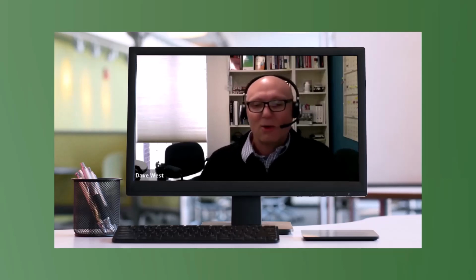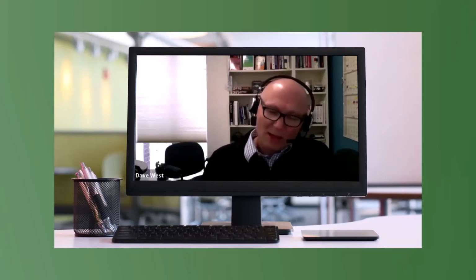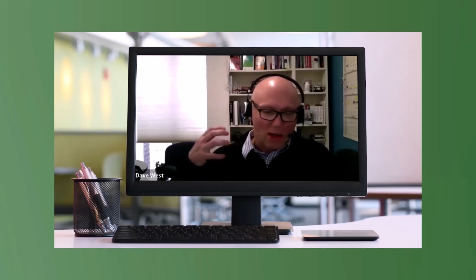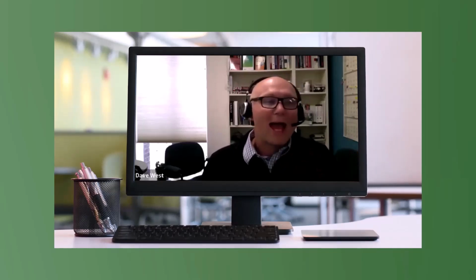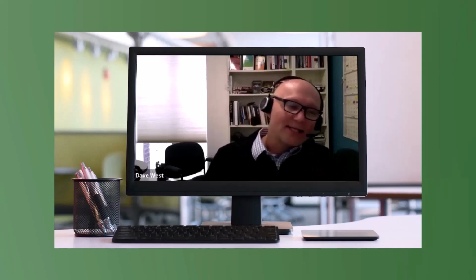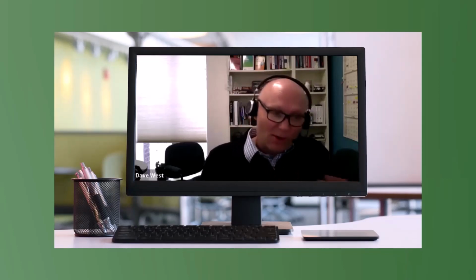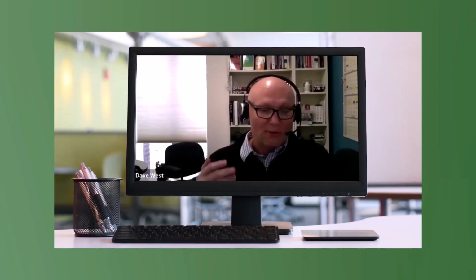So when you take an existing organization and you compare it to that, you say, well, all right, we've got business analysts, we've got project managers, we've got maybe a team lead, maybe we've got the manager that runs the group. Who goes where? So they're looking at that. I discourage that. Obviously it's important, you need to think about it, but let's start instead with, okay, let's look at those accountabilities. So product ownership is all about making the decisions about the order of the items and the priority of those items in the backlog to deliver the most value.